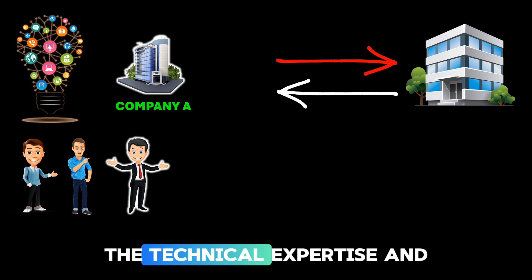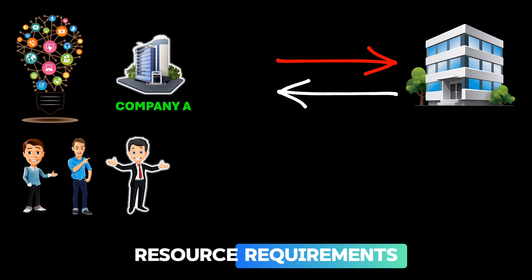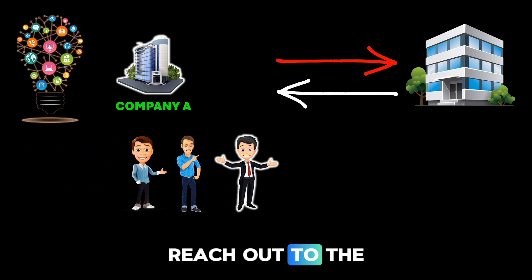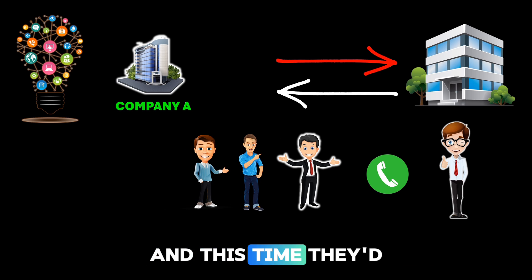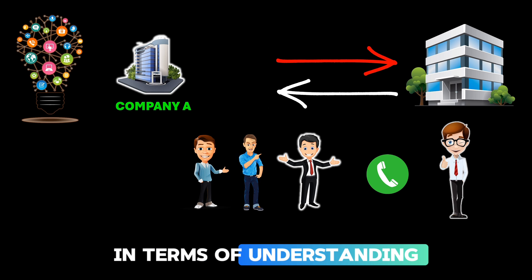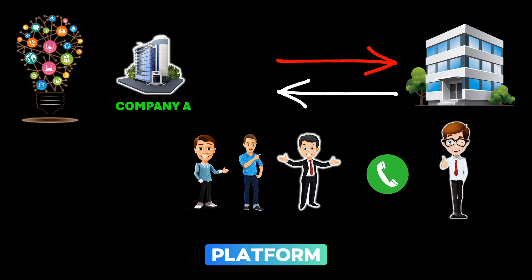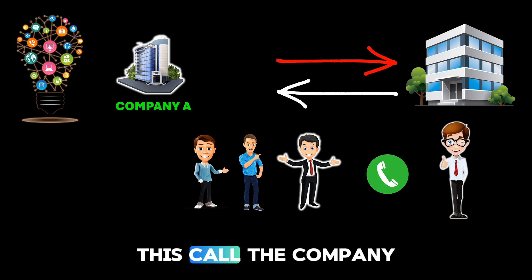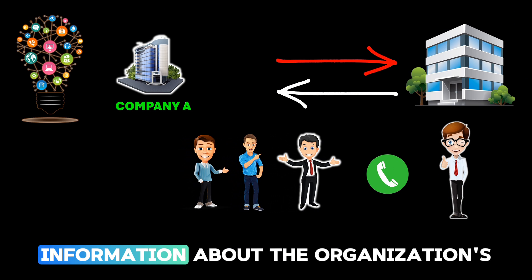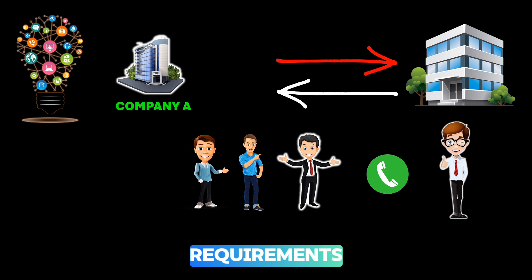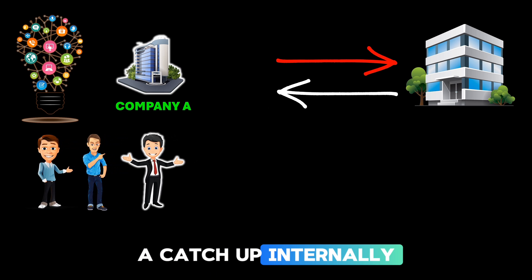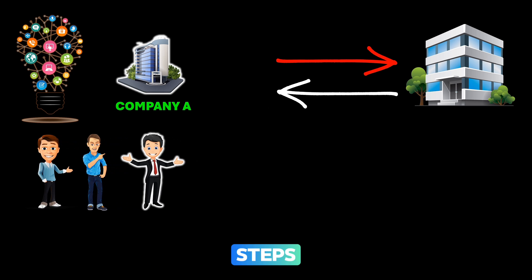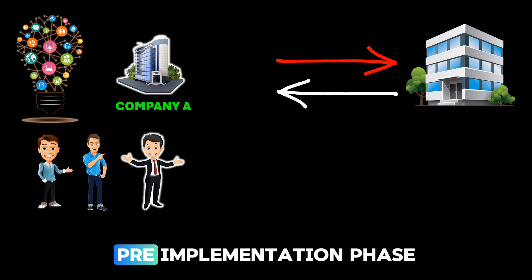If the requirements align with the technical expertise and resources, Company A would have another call with the organization, this time discussing in more detail: the organization's existing platform, the different data sources they have, their business needs, and other technical details. By the end of this call, Company A will have all the information about the organization's requirements and will have a catch-up internally to discuss the next steps. This would be the final step of the pre-implementation phase.